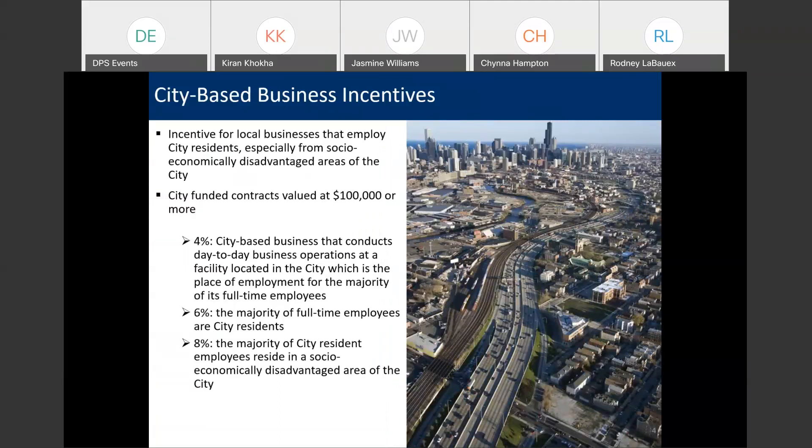The purpose of incentives is to encourage contractors to perform some type of behavior or refrain from performing some type of behavior. The first one we're going to discuss is the city-based business incentive, found in municipal code section 2-92-412. This bid incentive has categories at 4%, 6%, and 8%. At the 4% level, if you're a city-based business, meaning your main office is located in the city and the majority of your full-time staff is located in the city, then you're eligible for a 4% bid incentive.